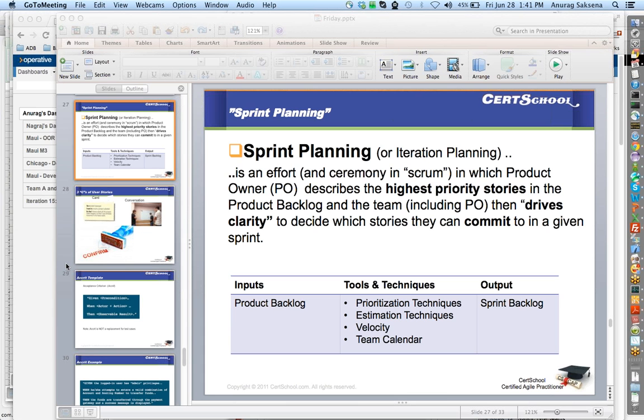Epics, we talked about them last Friday. Epics are another way of organizing your stories. So it is something at a high level. You use the same user story template, but you write an epic which is decomposed into multiple stories. An epic should decompose into at least two user stories. Okay, so there's a question on sprint planning.